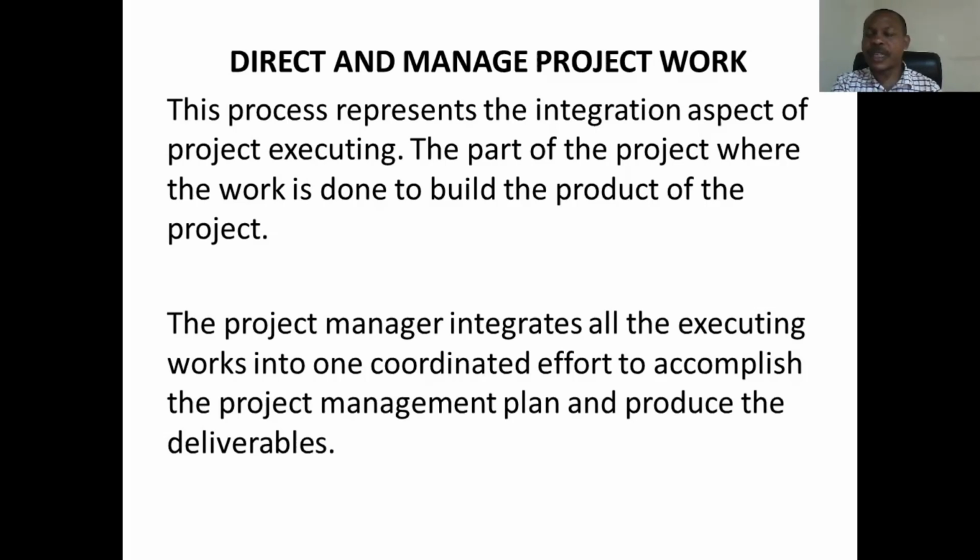You want to take these records and compare the parameters to the plan that you have, which you call the baseline. You want to make sure your performance is in line with the baseline. That's the essence of carrying out a daily check on the project.